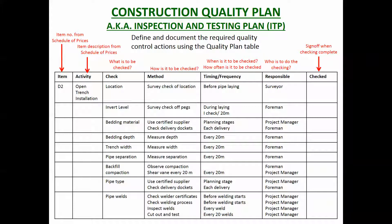Construction quality planning at our level is quite simple, but when you get into more complex projects or projects where failure is much more serious — such as a motorway or a nuclear power plant — the quality planning is much more intense, much more expensive, and takes up much more resources. But you need to do it because of the nature of the job.